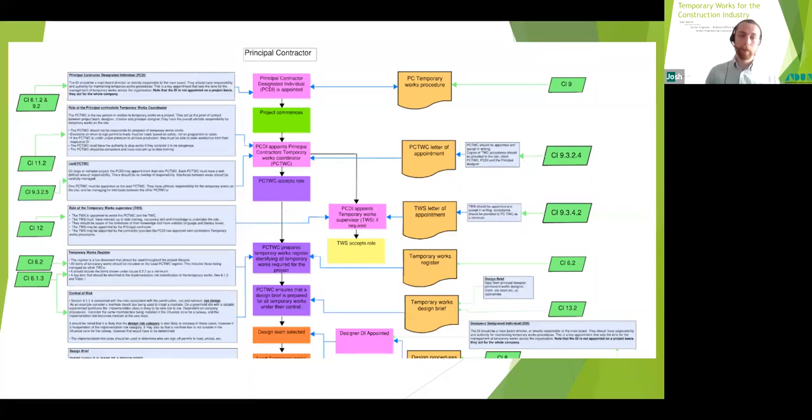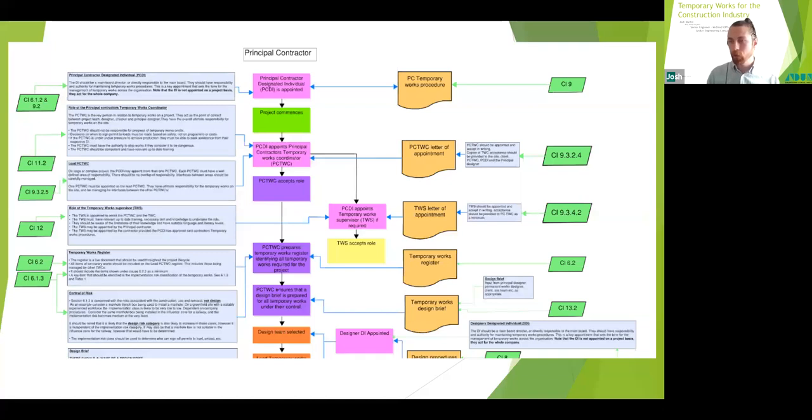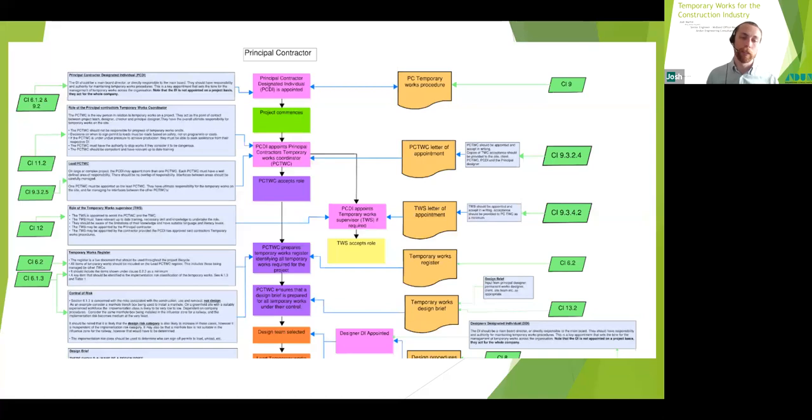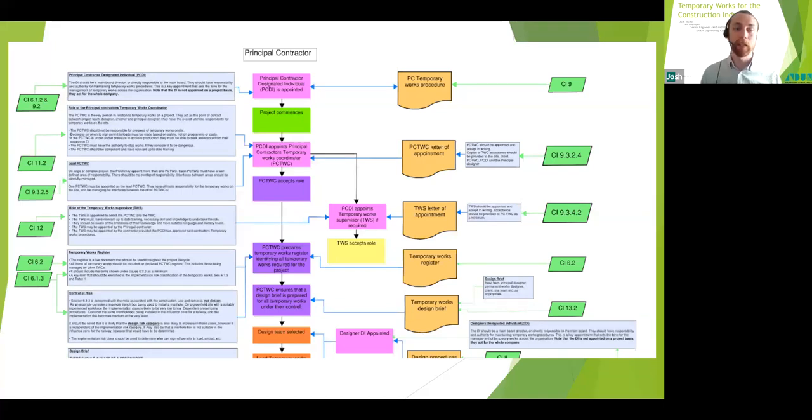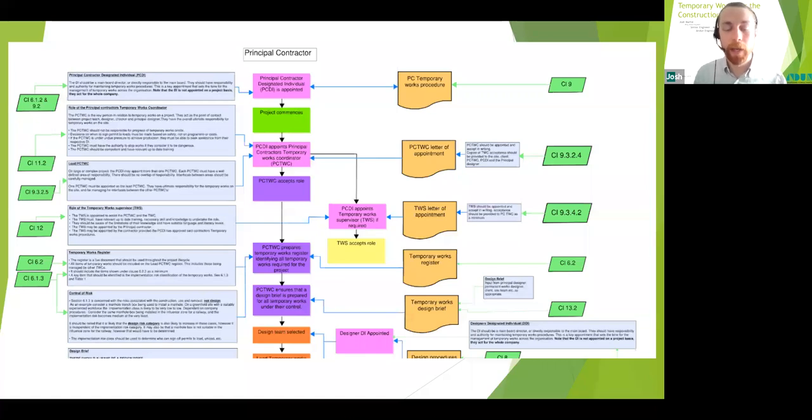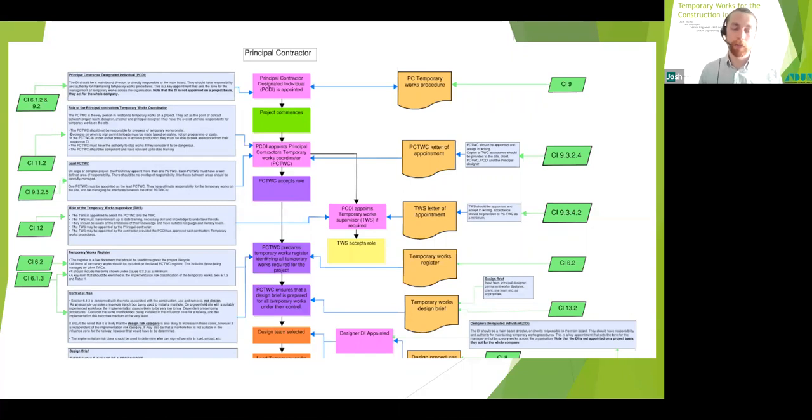The temporary works coordinator may require temporary works supervisors or TWSs to assist in carrying out the duties. But remember, you can delegate the work but never the responsibility. It is the responsibility of the temporary works coordinator to ensure his duties are carried out, whether he actually does them or not, as I've covered, is a different matter. In most cases, though, it's prudent that the temporary works coordinator carries out most of the duties—i.e., reviewing method statements—just to ensure that they have a good and sound understanding of the tasks that are being carried out on site. The temporary works coordinator will prepare a temporary works register, which is a live document and used to identify, track, and control temporary works. Dave's going to discuss this document a little bit later.